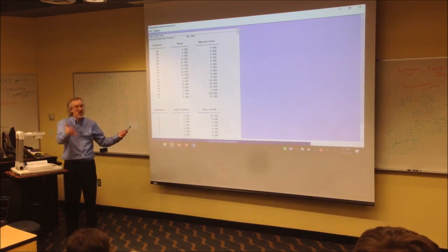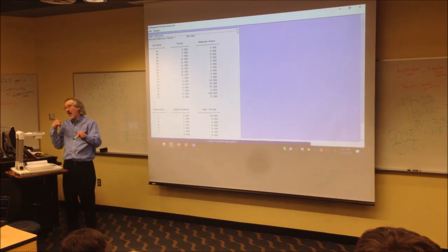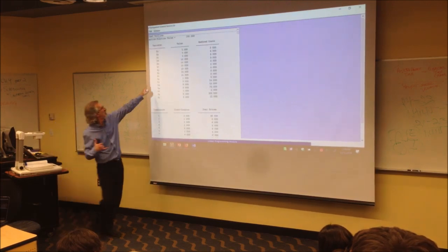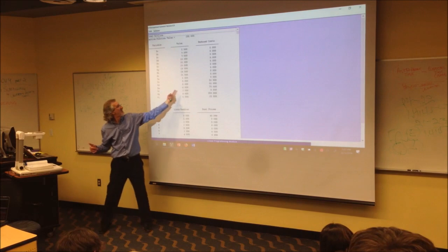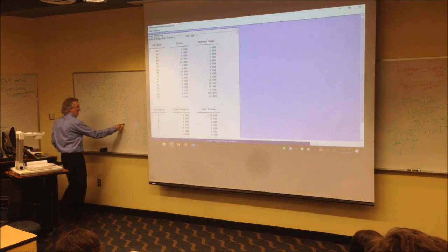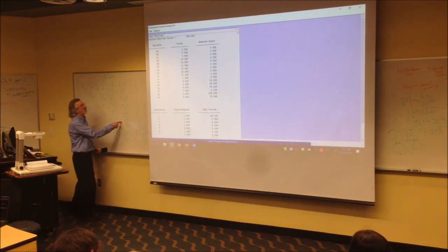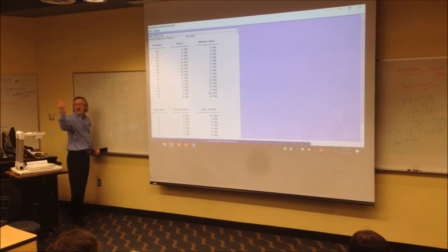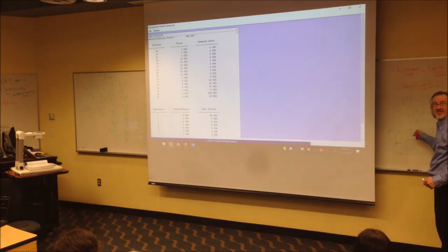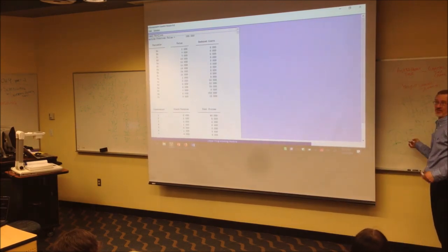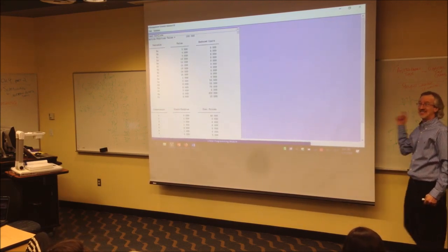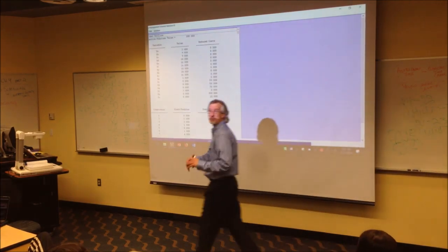This saves you a ton of time. You know exactly which activities. You get a hold of those 2 activities. You say, we need 1 unit of time out. We're willing to spend the extra money out of that $200,000. And F, you're on for 3 units of time at whatever that cost is. Where's that cost? 180,000, 60, 60, and 60. And what was the other one? 20,000. Whoever said A is correct. Did anybody else say F? Now, one of you thought it was F. So this is why, even with a small number of activities, 12 or 9 or whatever, linear programming will get you to the best answer and spend the least amount of money.